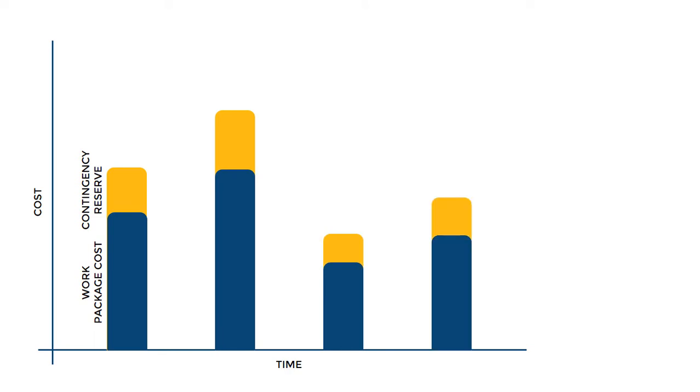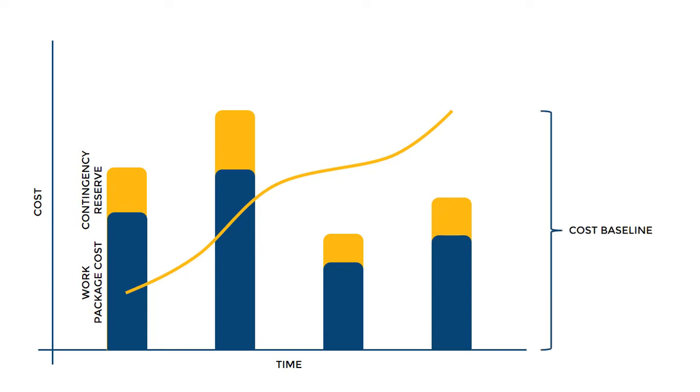Accumulation of these cost estimations for each work package translates into the S-curve of the project. In project management terminology, we call this the cost baseline of the project.